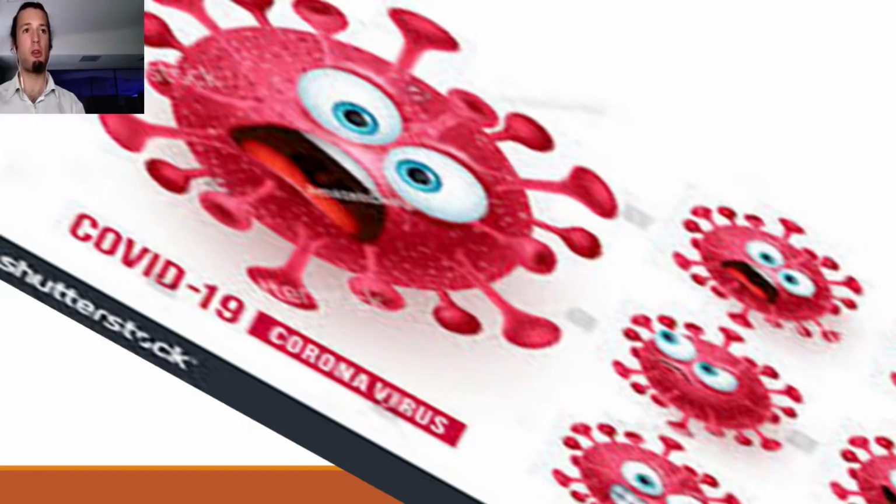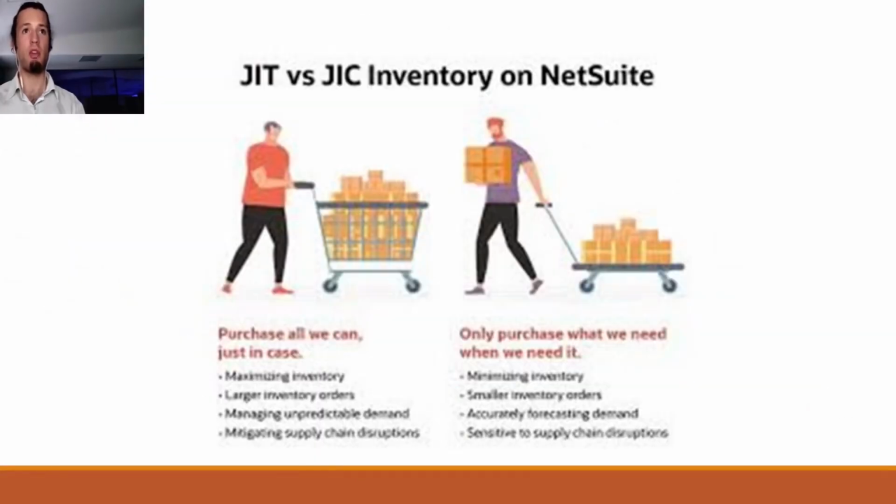This project primarily relied on just-in-time delivery to keep sites clear and lean. However, the pandemic made the model a liability for specialized terminal components, specifically the structured steel and highly complex automated baggage handling systems. The response was a fundamental shift in procurement strategy, moving from just-in-time to just-in-case. By securing early procurement and utilizing off-site storage, the project successfully decoupled delivery risks from the on-site construction sequence.